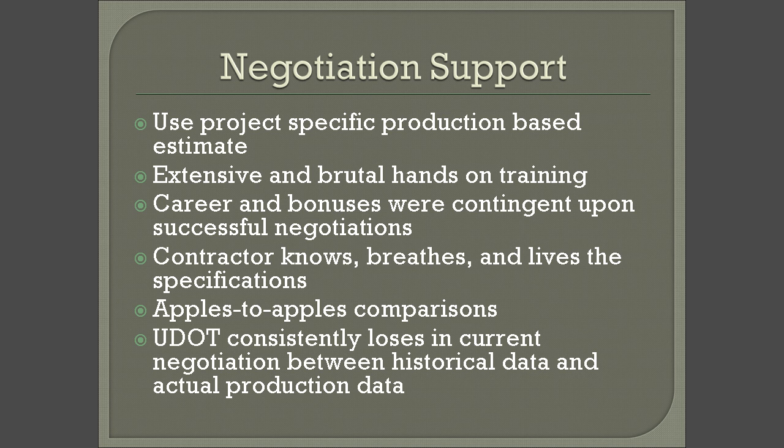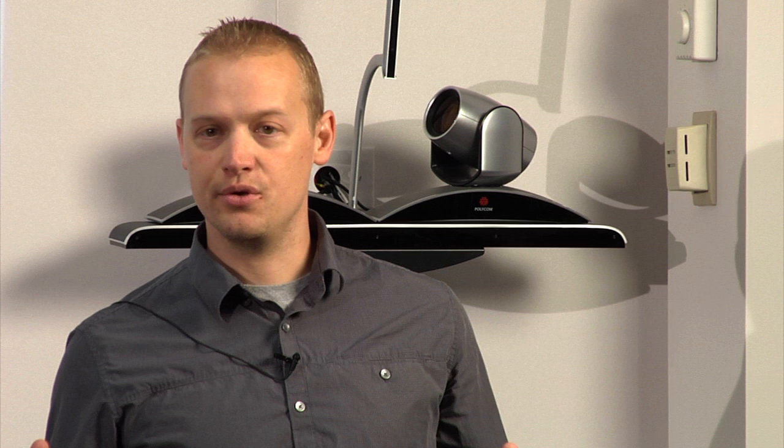And then George talked about this negotiation support. I don't know how many of you guys have been involved in CMGC projects or CMAR projects, but this is where the contractor is involved early on design by an RFP. Okay, they're selected on the best value. The most qualified contractors for that project are brought on, okay, to help the design and the designers and the owners work through all of these problems. They identify risk. They provide these cost estimates to help support the design decisions, okay? And they bring out those innovations that, hey, maybe if you do this, then it will cost less and we'll get it done faster. Okay?